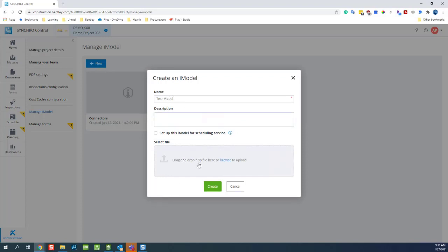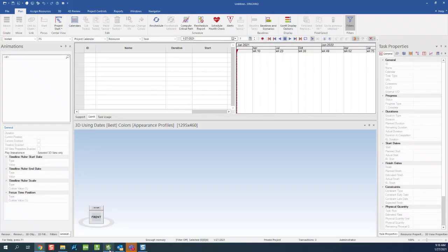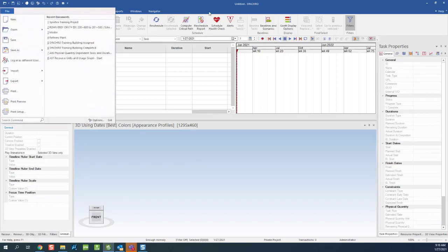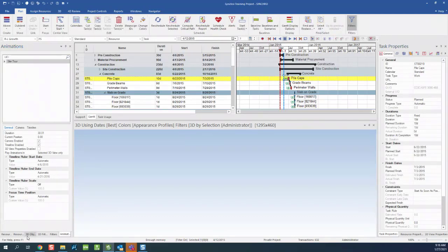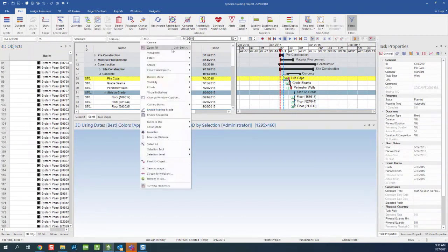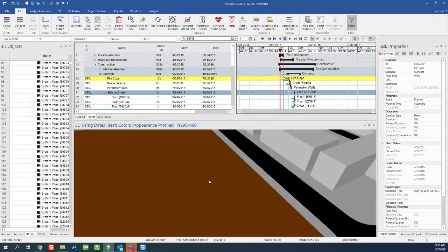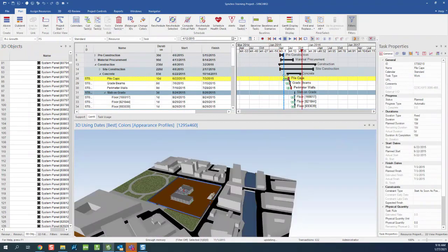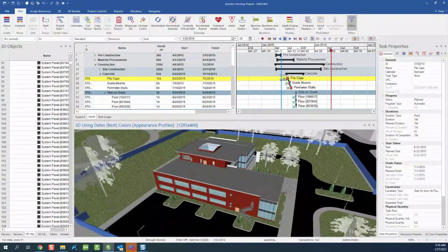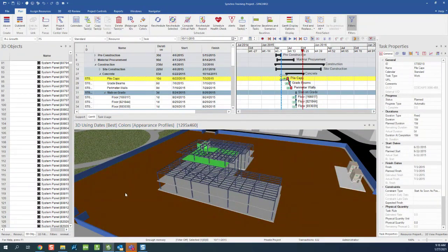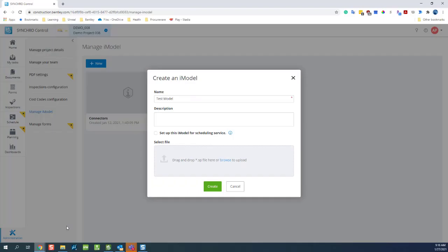Description. So if you already have an existing SP file, what is an SP file? If you're working with a Synchro project, in Synchro 4D Pro, that's a desktop application, and this is your main workhorse where you actually produce your 4D model by importing 3D models and a schedule, or creating a schedule directly within, and you define that 4D model here. So you can save this as an SP file, and once you have that, you can drag and upload that SP file over here.